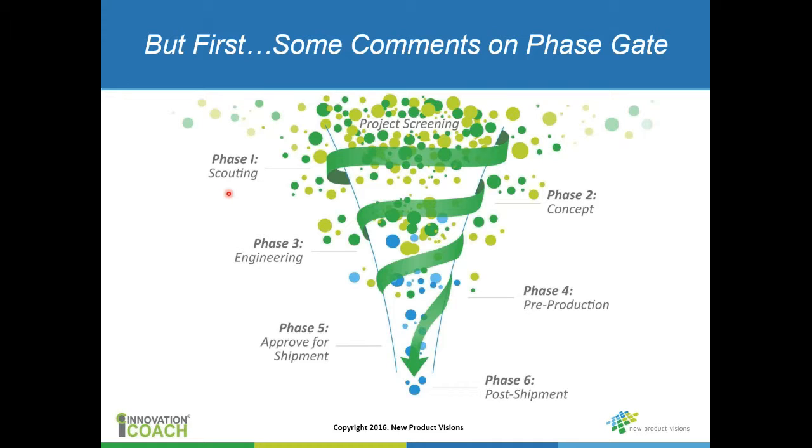So you've got these multiple phases with high-level deliverables that are really going to drive the project schedule. And then you come to the business to get approval for each phase, and so there's a management oversight function where you get management approval to go from phase 1 to phase 2 and through the project.